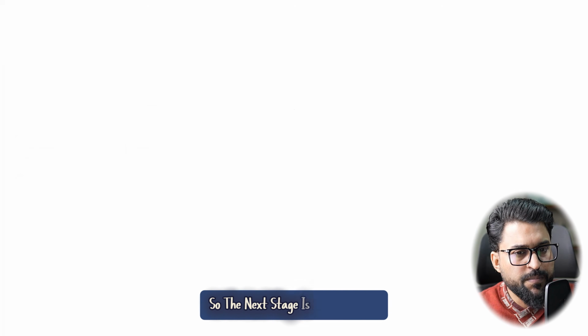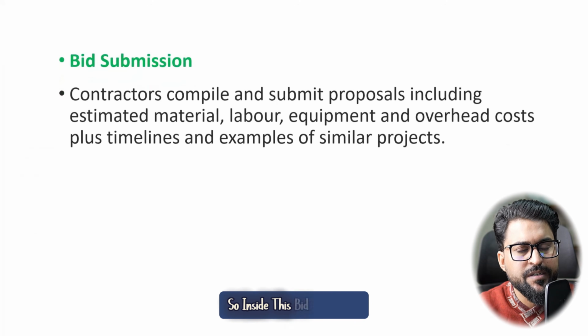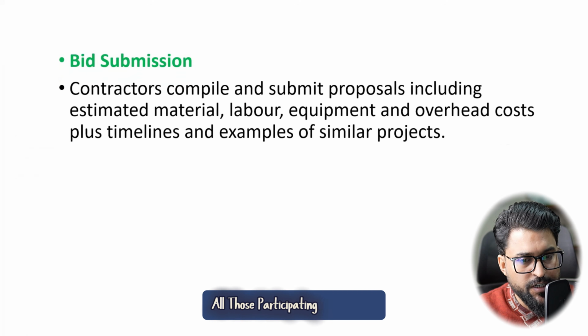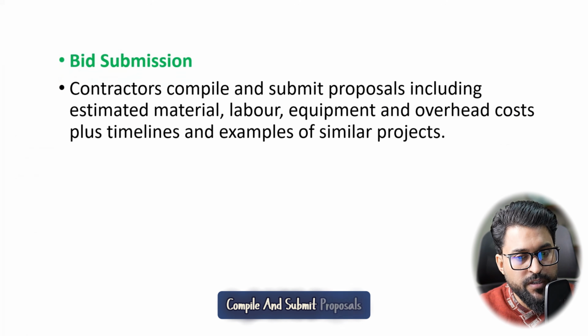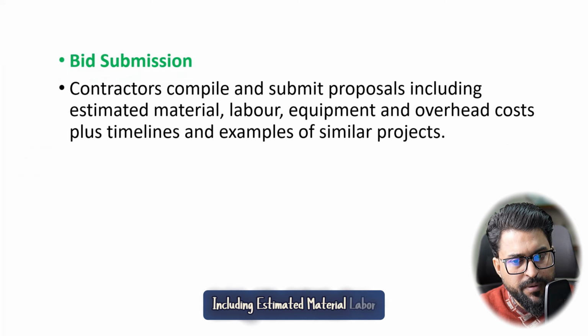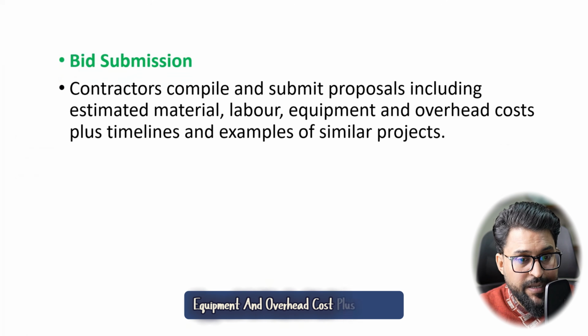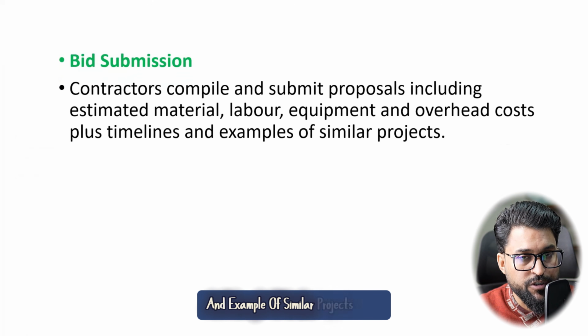So the next stage is bid submission. Inside this bid submission, all the participating contractors compile and submit proposals including estimated material, labor, equipment and overhead cost, plus timeline and examples of similar projects, right?